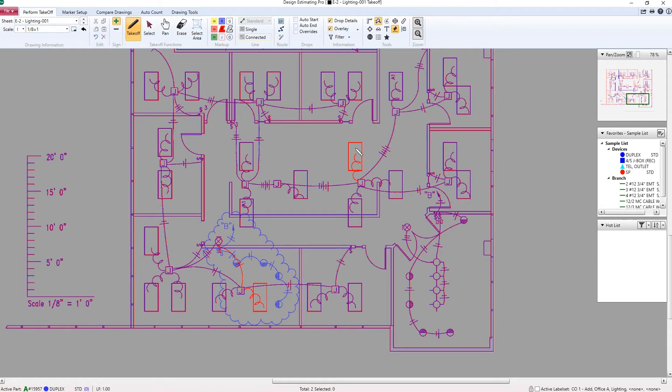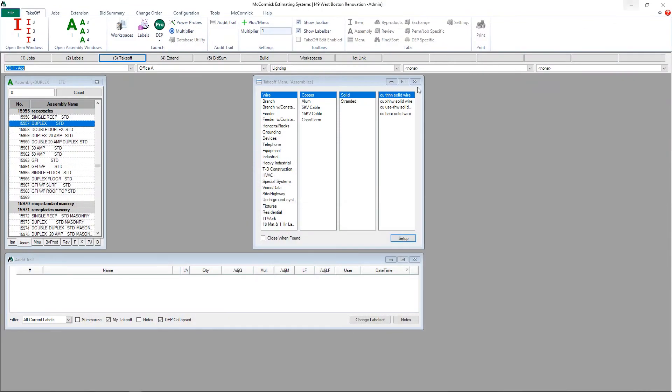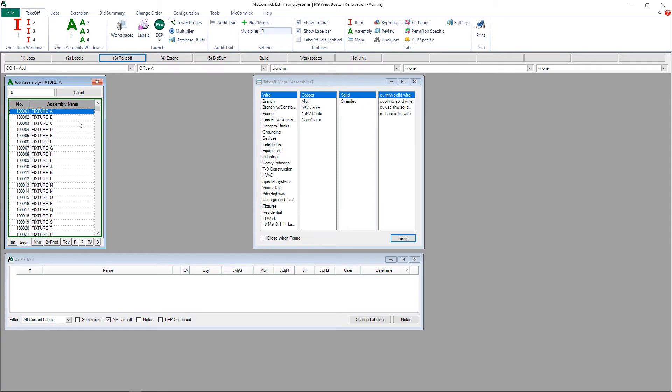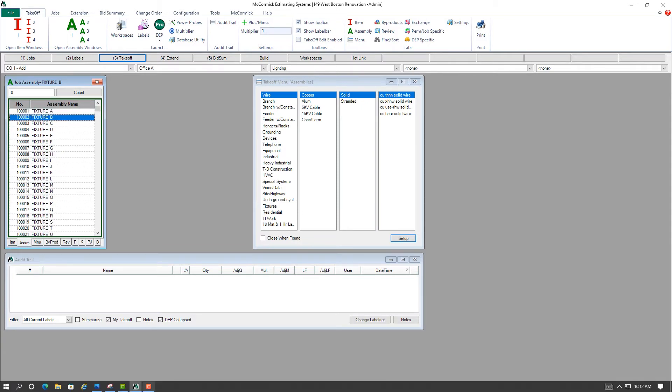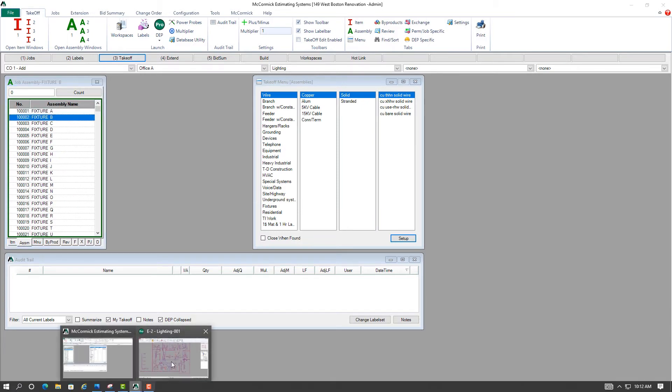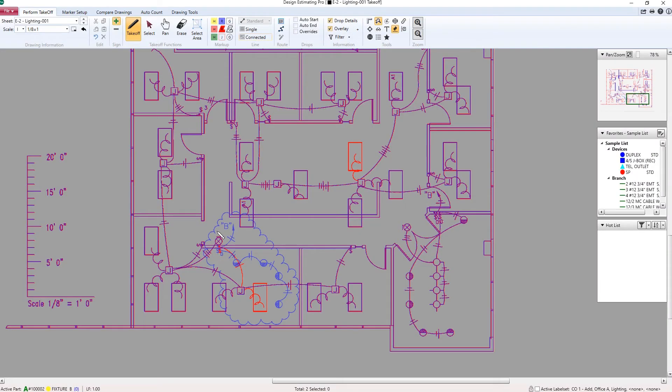I'll go ahead and do the takeoff for Change Order 1 Add right on the plan. Here I have a lighting plan and a revised lighting plan and an overlaid view. I have a few can lights that have been added, so I will select that part from my database. We'll call it Fixture B. And I'll just simply point and click on each one of these.